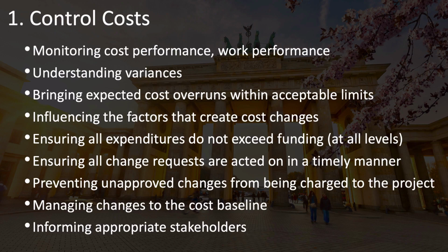Control costs is the process that monitors expenditures to make sure they don't exceed their budgets. And it's not enough to keep an eye on just the overall project budget. That doesn't provide enough warning. You need to measure actual costs and compare them to planned costs at all levels, from the project level down to deliverables, control points or control accounts, and even individual work packages and activities.